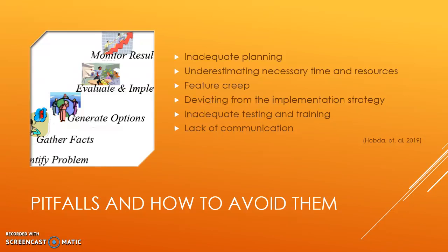Take care not to begin adding features and functions that were not in the initial plan, as this affects the initial timeline and can increase costs. This is referred to as feature creep. If planning is done adequately before the project starts, deviation from the implementation strategy will not be necessary. Adequate planning is essential to success.